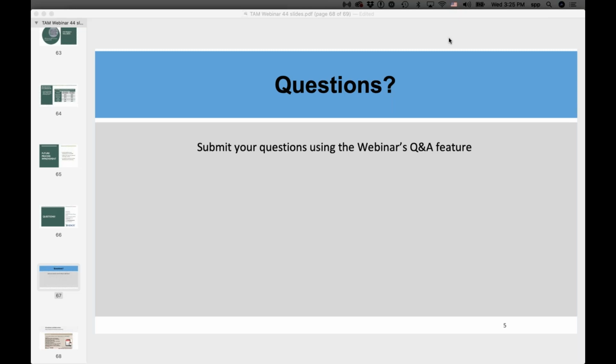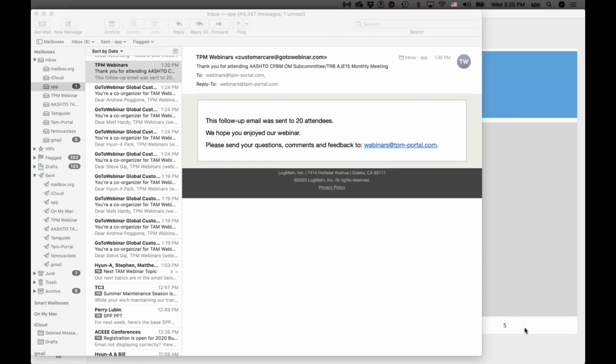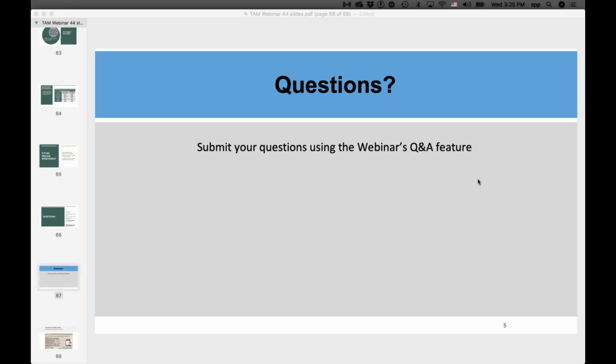That way, more in-depth pavement evaluation, like non-destructive testing, can be done early on before the scope is finalized, so we get a better estimate of the entire project cost, and anything along the line that needs to be changed gets finalized before that even goes to the final STIP. So it works out really great. It takes good communication to get the scope correct and get all the elements into that project together.